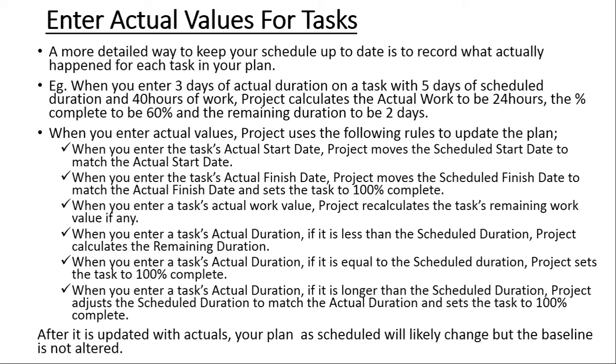After you have finished updating your plan, more often than not, it will be different from your original plan. But whatever you saved as a baseline will always remain static, because it is just a snapshot. It is not changed or affected by the actual values that we enter.